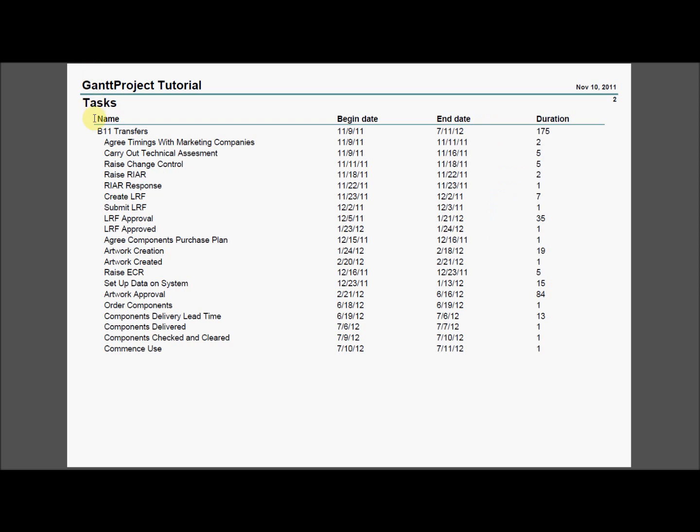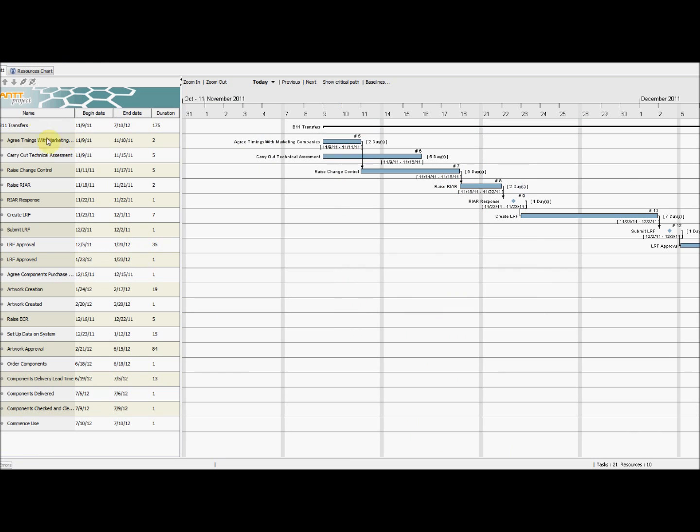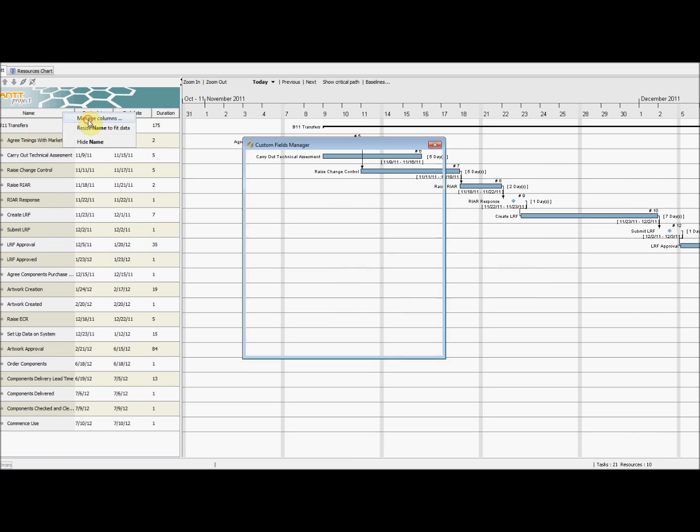If we wanted more fields to show on the report, we would select for them to be shown in the Details pane under Manage Columns.